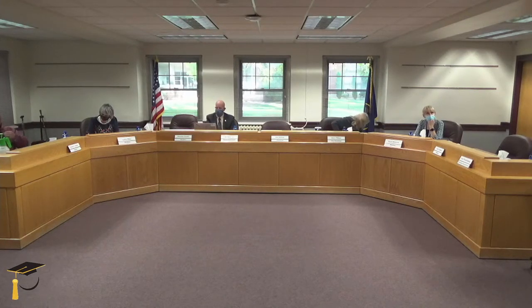Completion. So the building will be complete next summer. We have to complete the building and start the demolition of the old building. The second school gets out next May because we have to complete the parking lot and the fire lane in order to get the certificate of occupancy next summer. And then at that point, once we start the demolition, students can move into the new building next summer, and then we will finish demolishing the existing building and remove it and put in the playground.